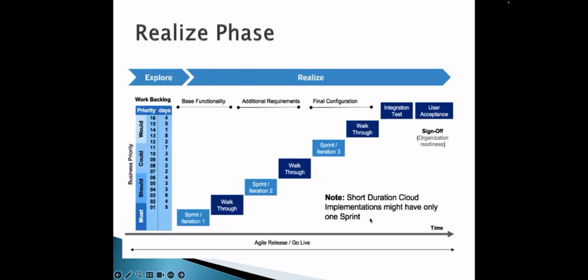Agile. So an agile based process is where you deliver the projects in an incremental way, and you showcase the progress of the developments at every stage. You can divide the stages into different intervals. So out of these 8 months, every 45 days you can conduct a meeting with your client and showcase whatever the progress is.